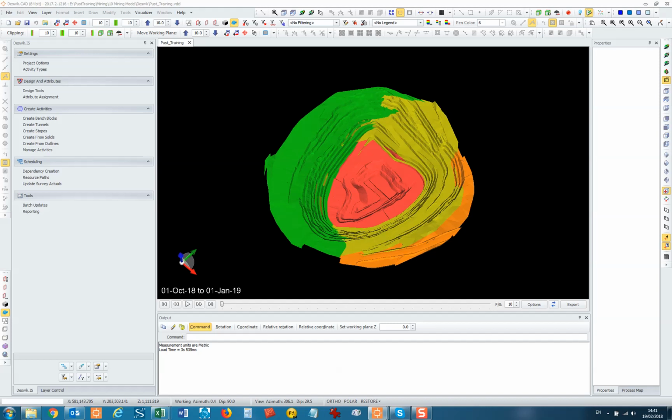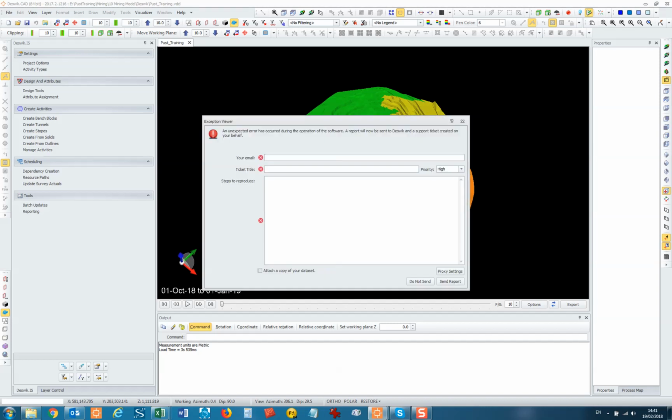No, really. This is the thing as well, which was difficult to explain to Alexi. This is not an optimizer. It doesn't have the ability to look forward in time and make optimal choices. You already should know what the optimal mining sequence is here. That's the idea, and then you're actually just recreating it in more detail, with finesse. Now in the mill here, we only set a target for tonnage.